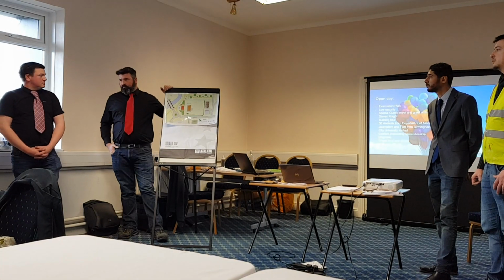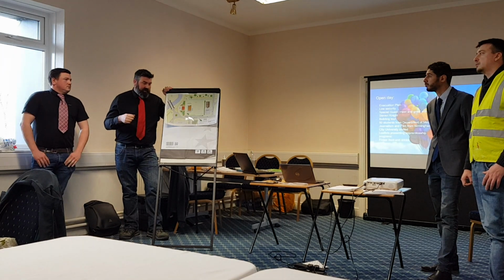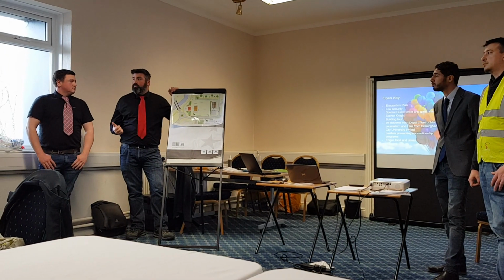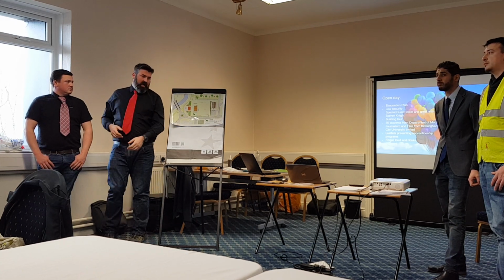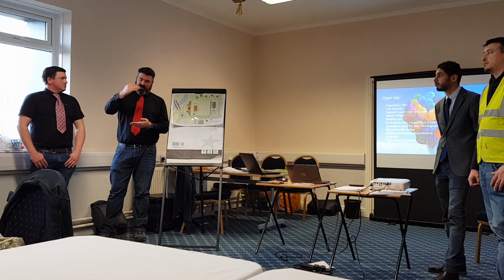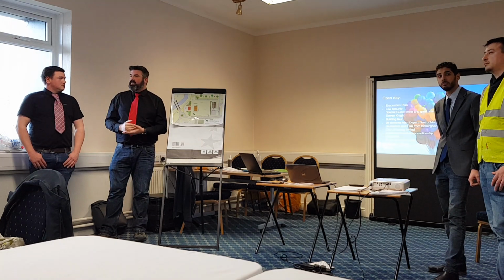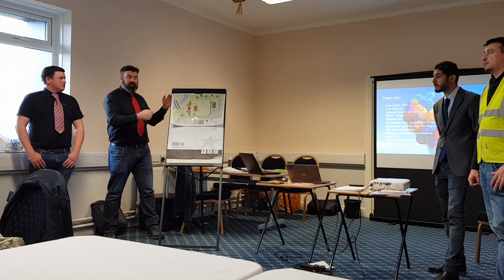Vehicle checklists. There'll be a vehicle checklist set up, and we've got approved contractors in terms of our delivery guys who bring the wagons in. Everyone will have a pack sent to them, which will detail what they need to have when they come to site. If they don't comply, a notice will be issued, and we'll have to maintain that because we're so limited on space.